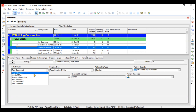Similarly, a finish milestone — for example, 'finishing of the first roof slab' — marks that the slab is done and consumes zero days. Milestones are used in projects, typically for lump-sum contracts, where the client releases payment upon completing a milestone. For example, completing the third floor slab releases 30% payment, and completing the tenth floor slab releases 60% payment.